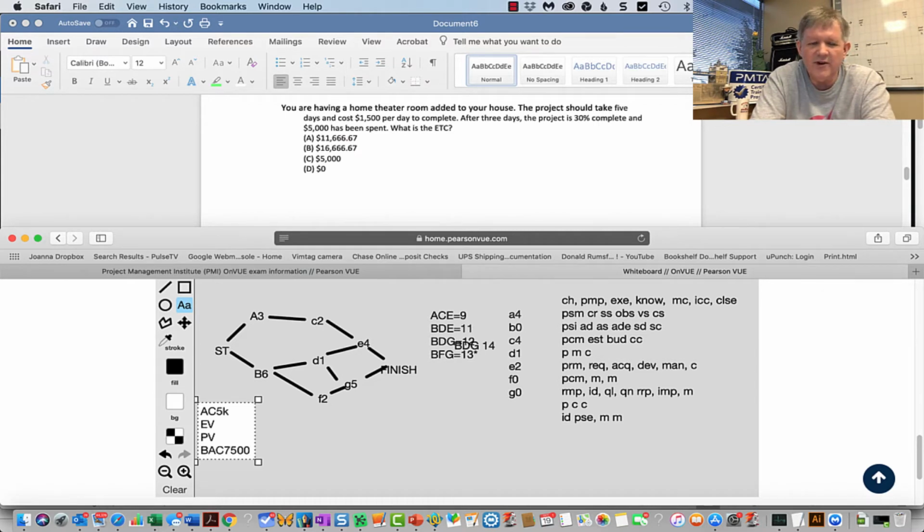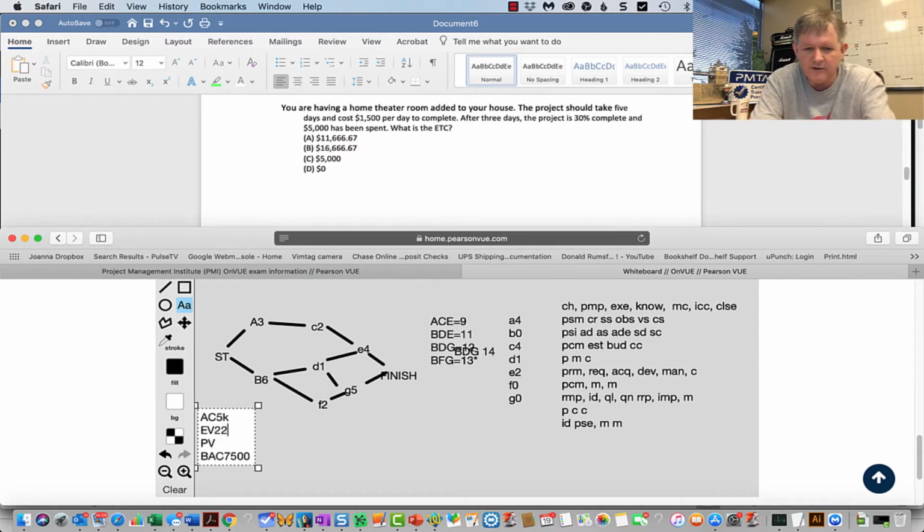So I've done 30% of 7,500, and so if I think about it, I'm going to break out my calculator, and so what do I have there? 30% of 7,500. So I'm going to do 0.3 times 7,500, 2250. So I'm going to go up there, 2250.